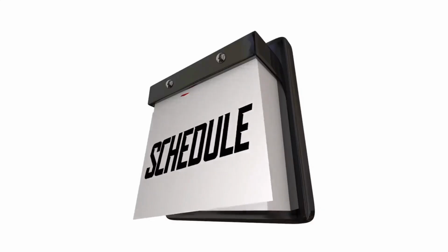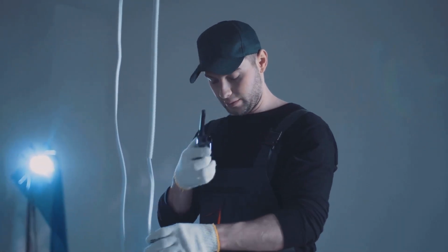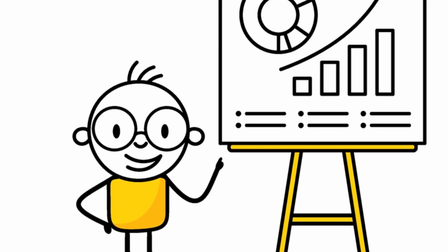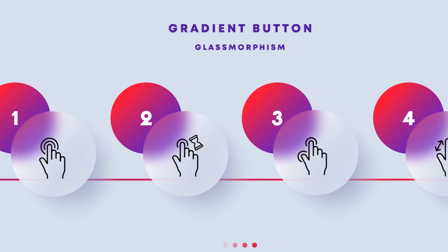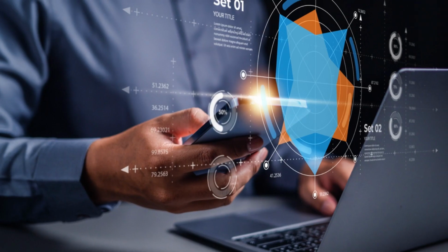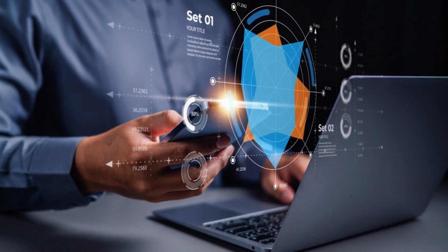Draw an arrow from D to a new node. From this node, draw two arrows, one to F and one to G. This clarifies that both F and G depend on D, but only F depends on E. Dummy activities are represented by dashed arrows. They don't represent actual tasks, but rather logical dependencies. By using them, we ensure that the activity network accurately reflects the project's workflow.